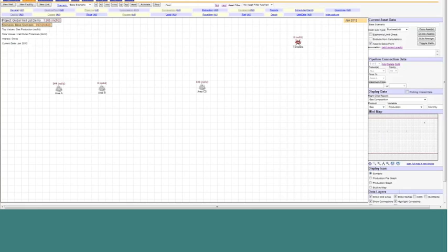And so what would typically happen in the past was, in this example, we have 4 areas. So we have wells that flow to area A, wells that flow to area B, and wells that flow to areas C and D. And we have them split out as different groups. Now they come in from the field or the drilling program as one big list. But what we would previously have to do in WellSpring was break this out into 4 different lists so that we can allocate rigs to different areas.